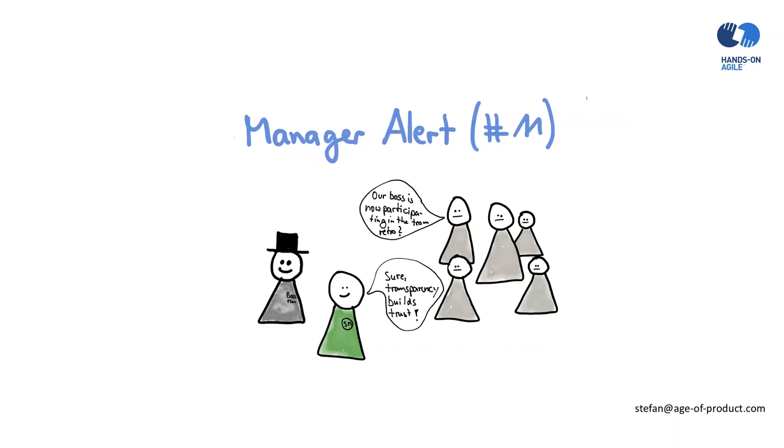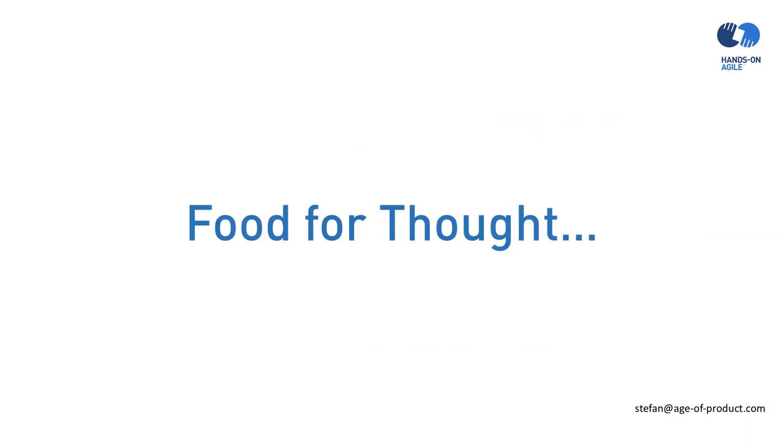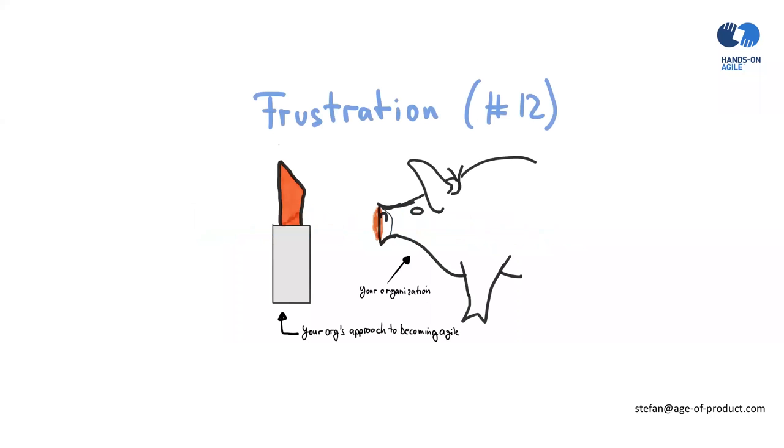Why don't you run a separate overall retrospective with stakeholders? Or maybe other Scrum ceremonies are suited for that too. Of course, there's the sprint review, but there's ample room for stakeholders participating in the daily Scrums. Chickens are always allowed to listen in. And I don't see any reason why they shouldn't be participating, for example, in a backlog refinement or in a sprint planning, as long as they don't try to influence the meeting itself. On top of that, there are plenty of opportunities to have a conversation: at the water cooler, over coffee, during lunchtime. There's ample opportunity to make this kind of communication happen in a structured way.